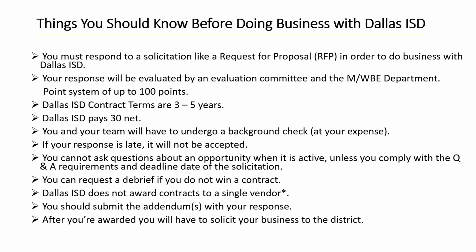Dallas ISD pays net 30. I probably should have said net 30 instead of 30 net. After you complete the services or provide the products, you'll be paid 30 days after you submit all your required documentation. So, 30 net or net 30.